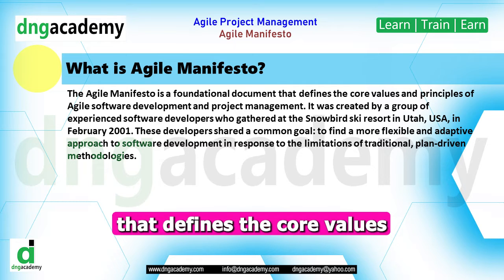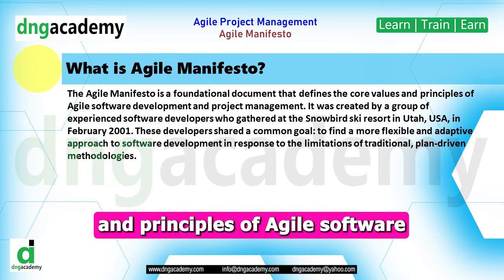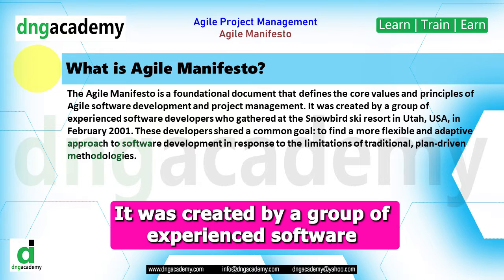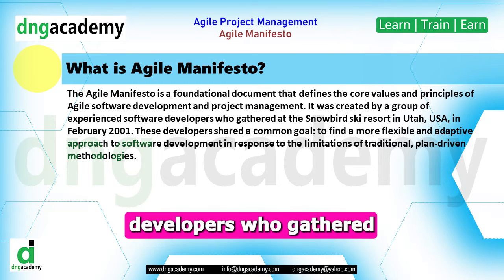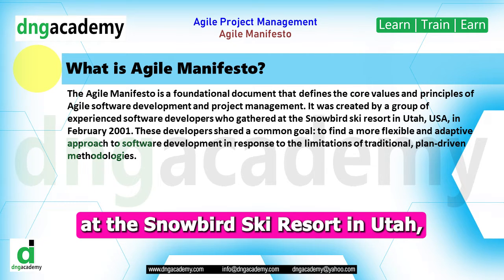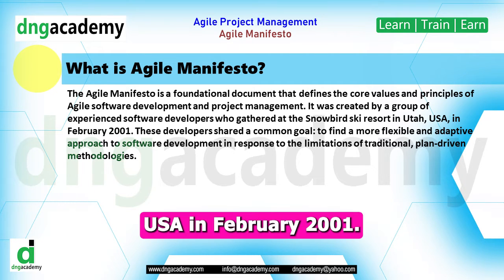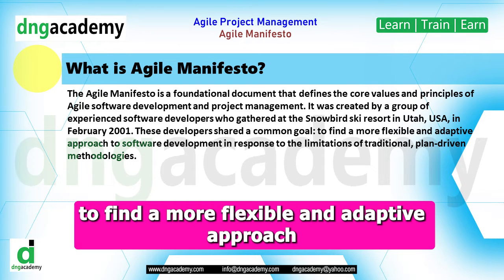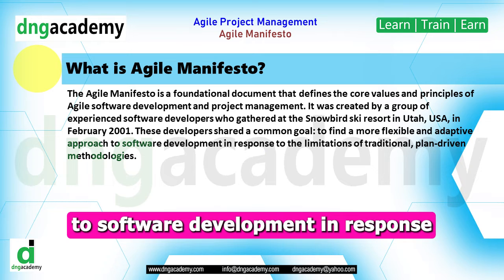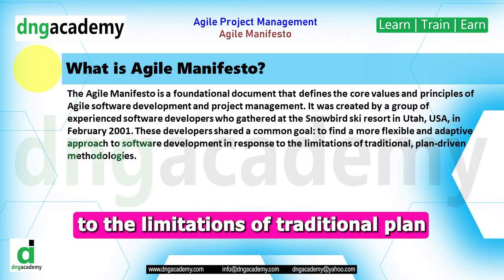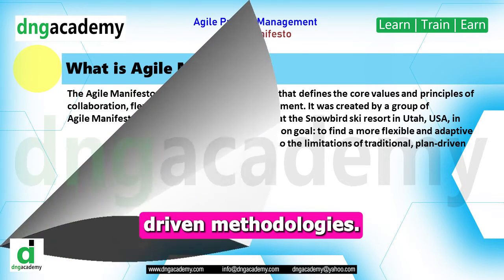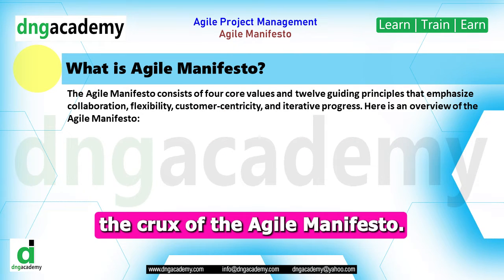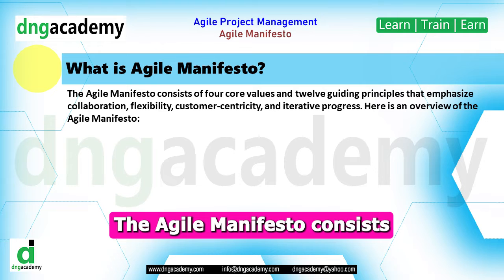Now let's move on to the Agile Manifesto. The Agile Manifesto is a foundational document that defines the core values and principles of Agile software development and project management. It was created by a group of experienced software developers who gathered at the Snowbird Ski Resort in Utah, USA, in February 2001. These developers shared a common goal: to find a more flexible and adaptive approach to software development in response to the limitations of traditional, plan-driven methodologies.